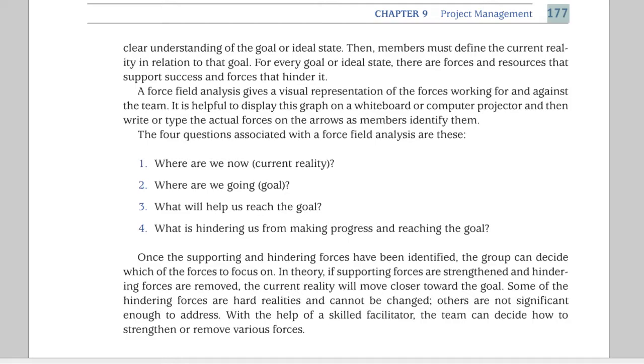177. Clear understanding of the goal or ideal state. Then, members must define the current reality in relation to that goal. For every goal or ideal state, there are forces and resources that support success and forces that hinder it. A force field analysis gives a visual representation of the forces working for and against the team.